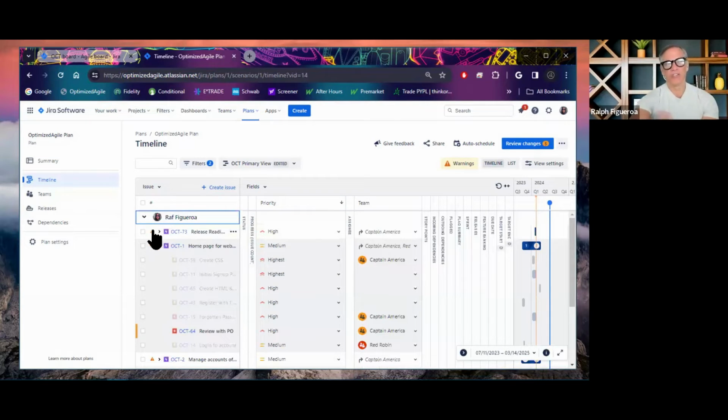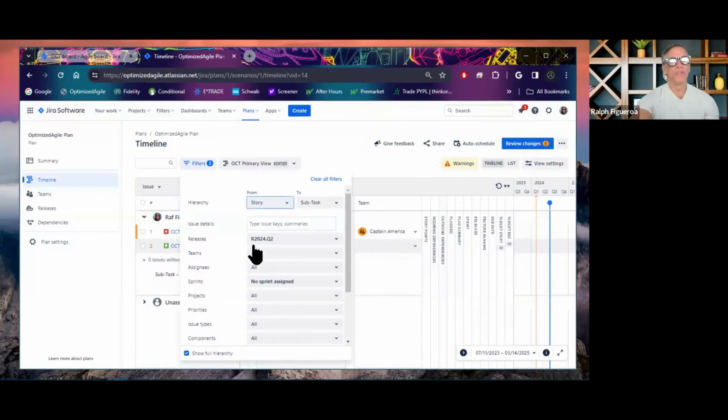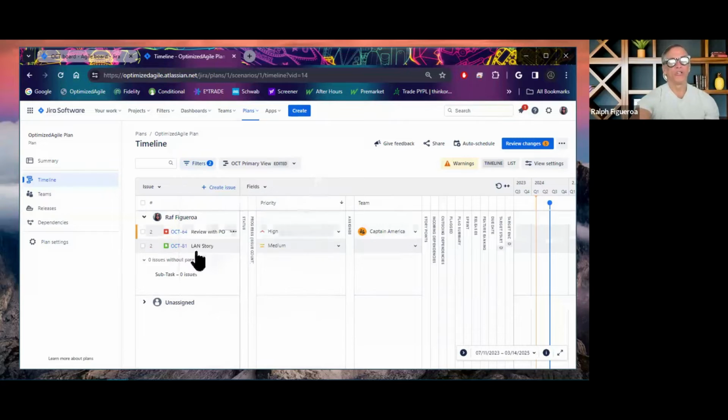And I can even, and I know this is outside of the scope of organizational changes, I can even move around and assign workloads. For example, if I have 5 users and one user has only 2 stories and everybody else has 7 stories, I would not assign things automatically because these 2 stories could be long poles. But I could talk to Raf and say, hey, Raf, Mary and Joe and Charles have a lot of work. We're still under the velocity. Can I assign some of this work to you? So it's meant to be a conversational tool, actually, to raise those things out.